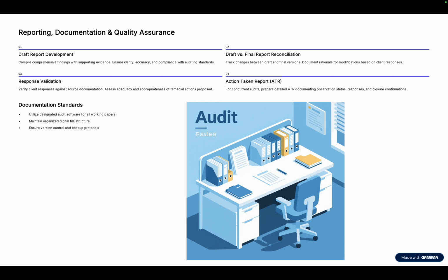And the version control has to be there, as we already discussed in our training session, that if some data has been amended, if some report has been amended, that version control has to be there. We just can't delete the old data and save the new data. Instead, we should maintain the versions. Like if there is something which we have got updated, that updated data might come with version 1.0, 1.1, 1.2, and any version, so that the differentiation can be there, and both the earlier data and new data have to be there. So that thing we need to take care of.